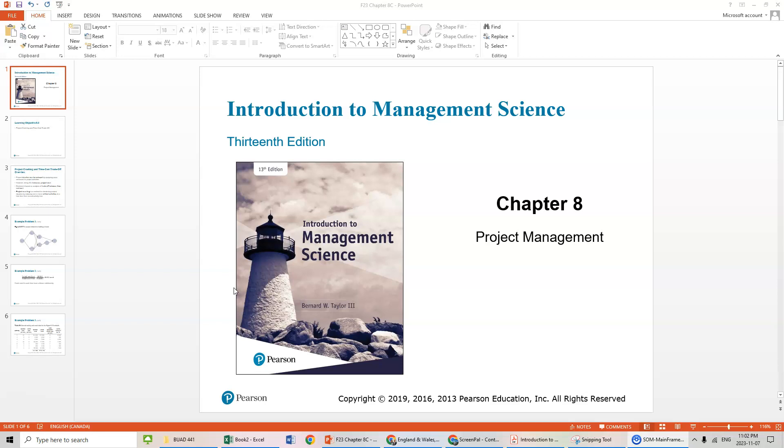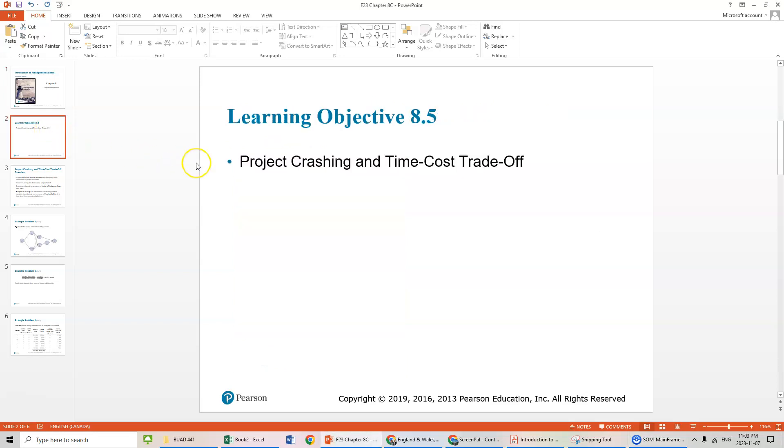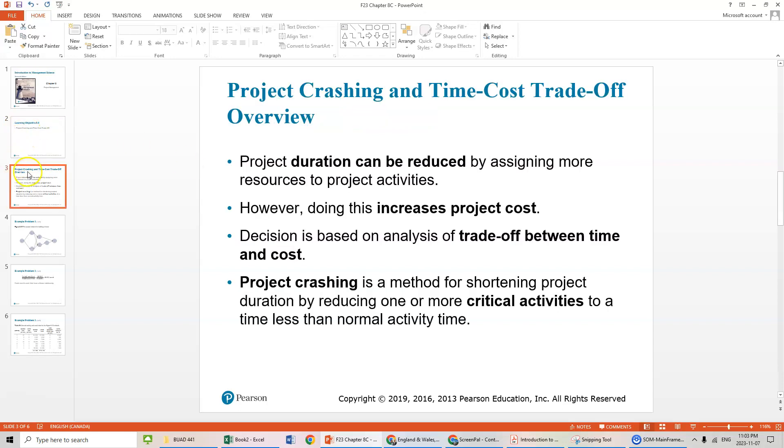Obviously if we shorten the project time it's going to incur costs. So in this section we're looking at various activity costs. There's a time cost trade-off. You want less time it's going to take more money. As it says, project duration can be reduced by assigning more resources to project activities.